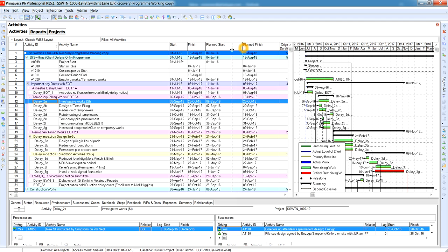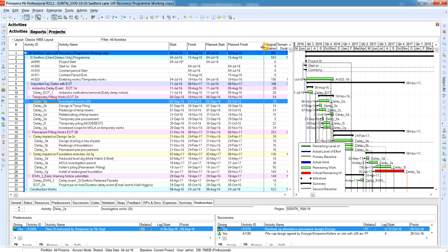What we're going to proceed to go and do is pull that to the side. I'll show you how to basically copy the actual baseline as an actual program. If you had any variations that you would like to have inputted, or there might have been a problem, there might have been a revision, a change of scope, a change of design, and if that came from the client, usually you'd raise an early warning notice, or that could come in the form of a compensation event, basically because it's outside the scope of the contract.